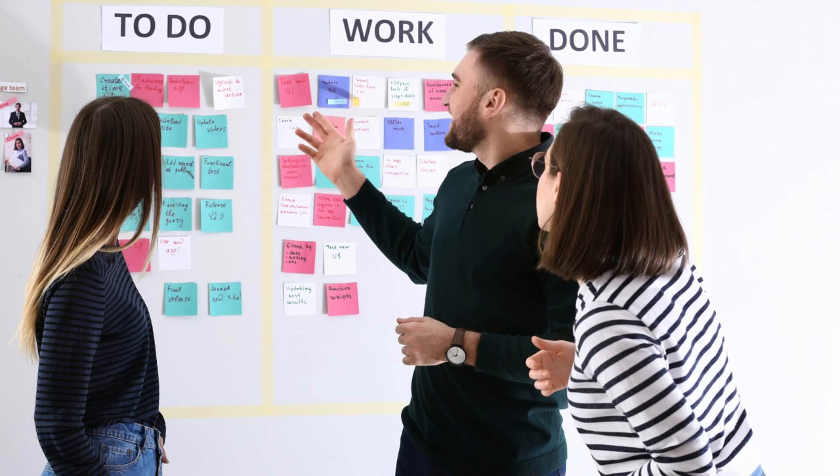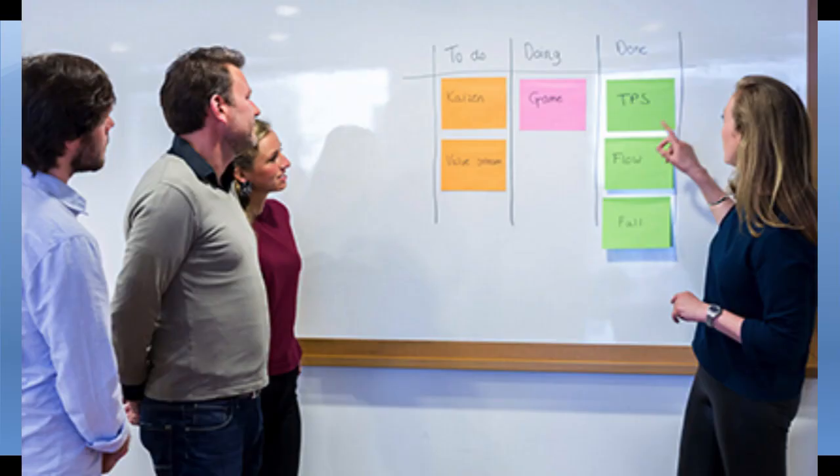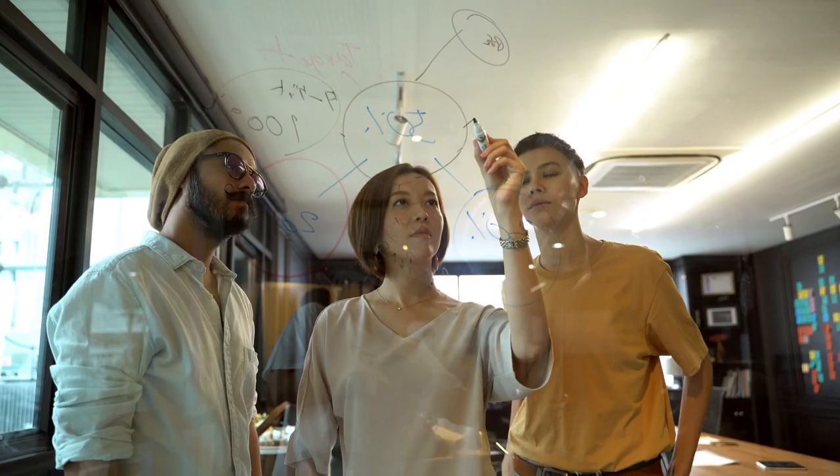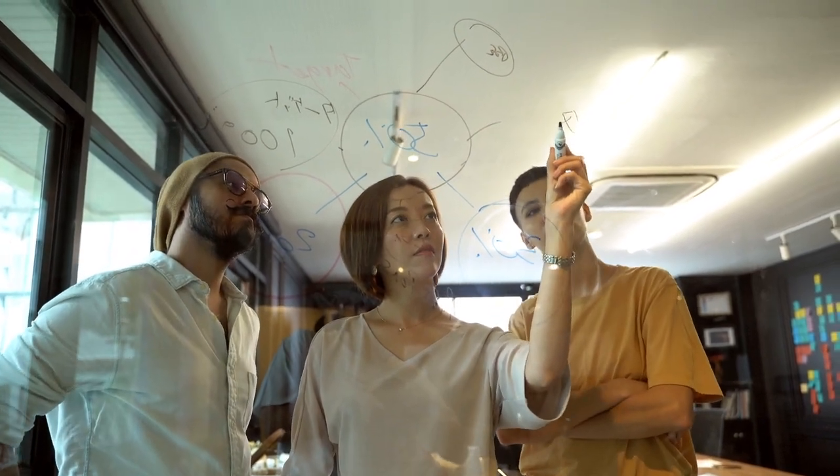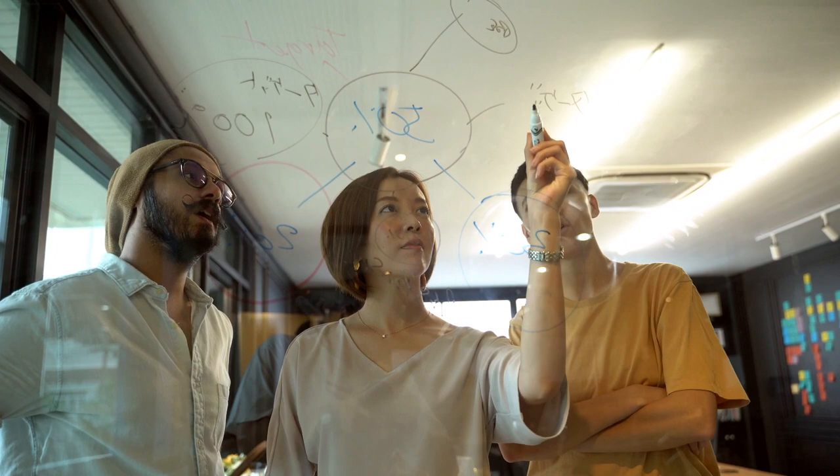Capacity planning means that the Scrum development team considers its historical velocity. Velocity here means the total story points completed in one sprint. Okay, so this is called velocity. For example, 15 story points are completed in one sprint, so that means the team's velocity is 15. Velocity is used to estimate how much work can be delivered in each sprint, and capacity planning helps determine the number of sprints required to achieve the release goals. For example, the release goals are clear, so in the capacity plan we will agree that 5 sprints are required to achieve the release goals.